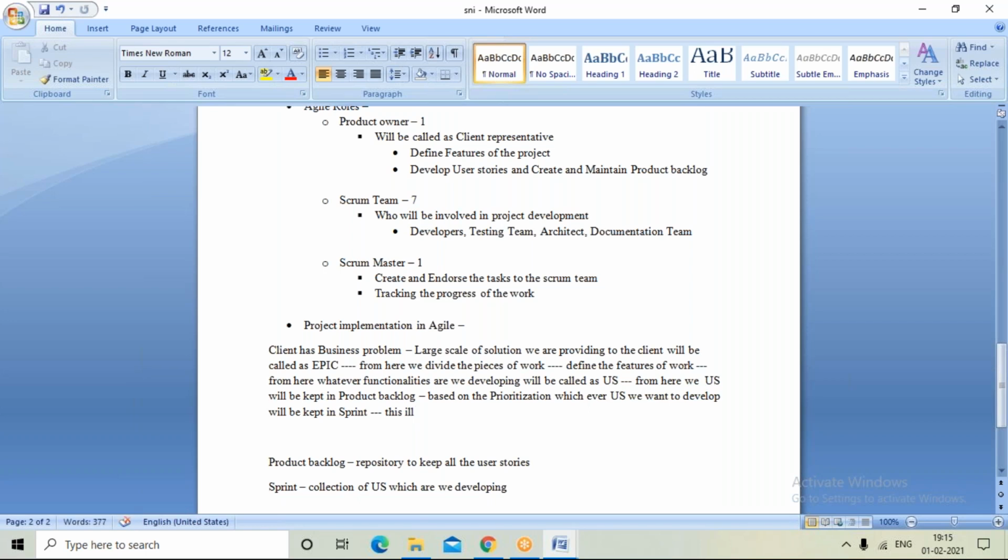So this will be given 2 to 4 weeks of time to complete. Means minimum 2 to maximum 4 weeks of time will be taken for us to complete the whole sprint. Completion means right from analysis to total testing. We have to make everything ready and we need to deliver it. That is the only thing we need to do. This is what we do here, right?